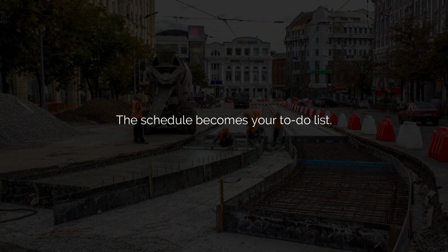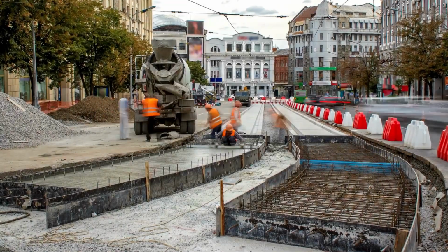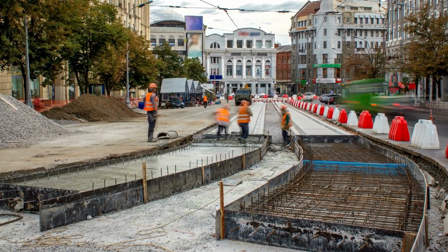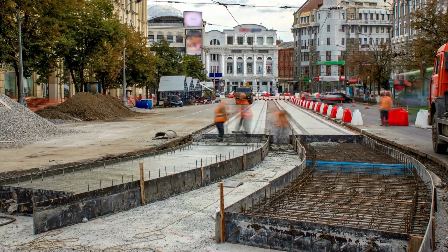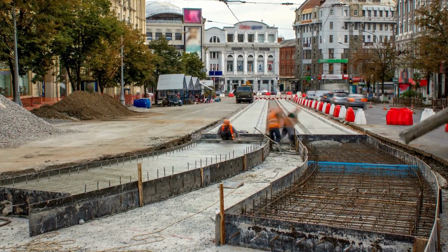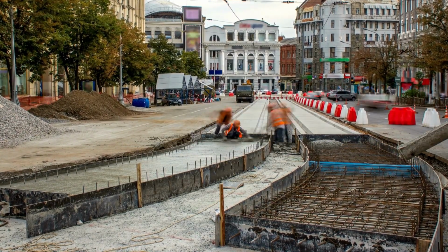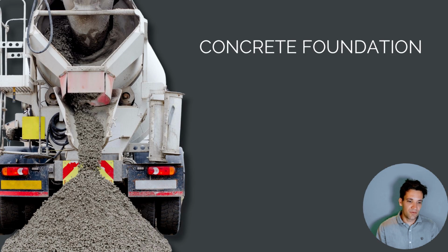Then we simply have to do all those tasks. That 3-week look ahead becomes your to-do list. You're constantly working through the list and doing everything, constantly checking everything's ready for the next task. For example, concrete foundations. What's everything that needs to be done to complete that task on time?